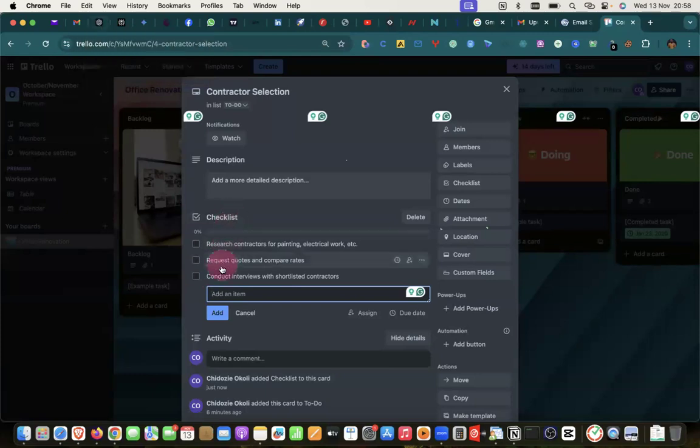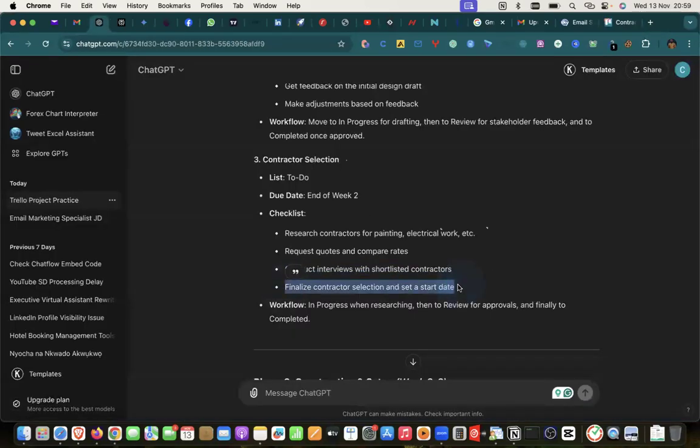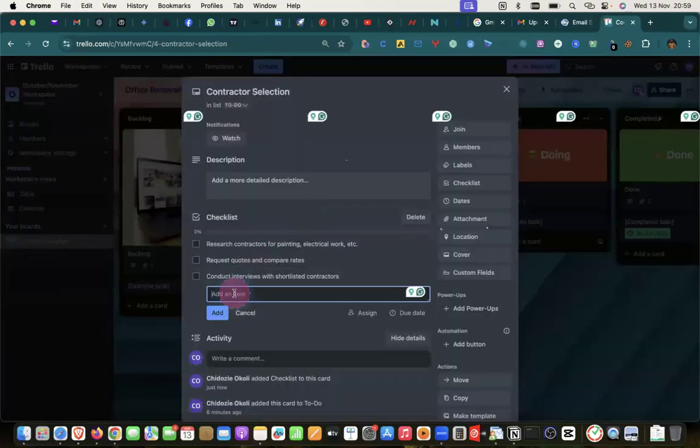It could be that the best bet for you could be maybe the 300, not even the 250, based on the kind of product. Maybe the wiring guy, the electrical guy, this one is saying he wants to use 1 mm for AC. This one is saying he wants to use 2 mm for AC wire. You know that 2 mm is going to cost more than 1 mm. So you understand the reason why this person's quote is 300 and this person's is 250. So if you start cutting corners by deciding to use the smaller wire for the AC, you know that tomorrow, whatever happens, you will be the one to blame. So it's not about selecting the cheaper one, it's about selecting the best for the project at hand.